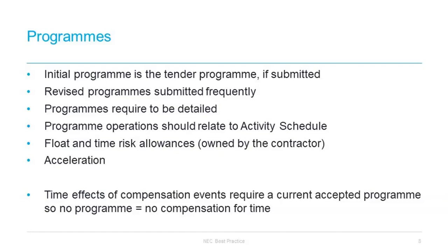However, in our experience, really, adjudication shouldn't be feared or avoided. NEC envisages that if there is, for example, an impasse on the programme, or really any other aspect, that you should have a short, simple adjudication on that question, so that, for example, with a programme, an accepted programme can be put in place by an adjudicator. Both parties then can put forward the case, and the adjudicator will reach an answer which will allow both parties to move on with the contract.